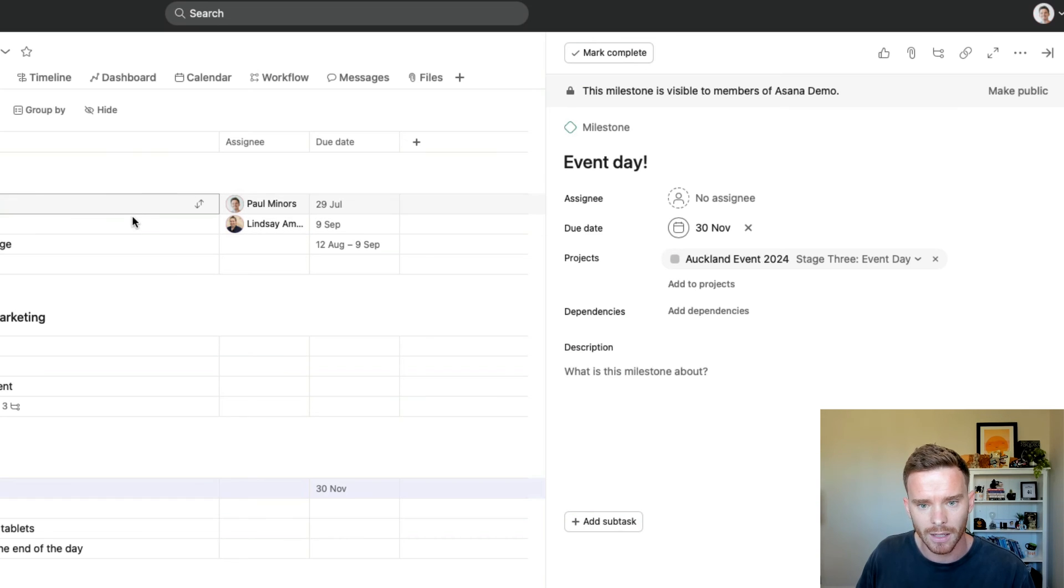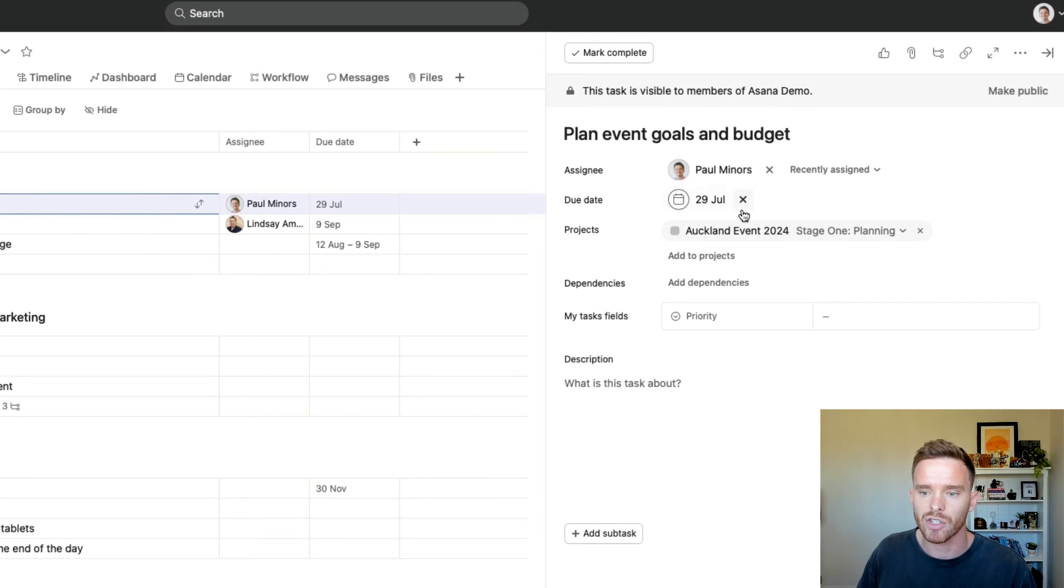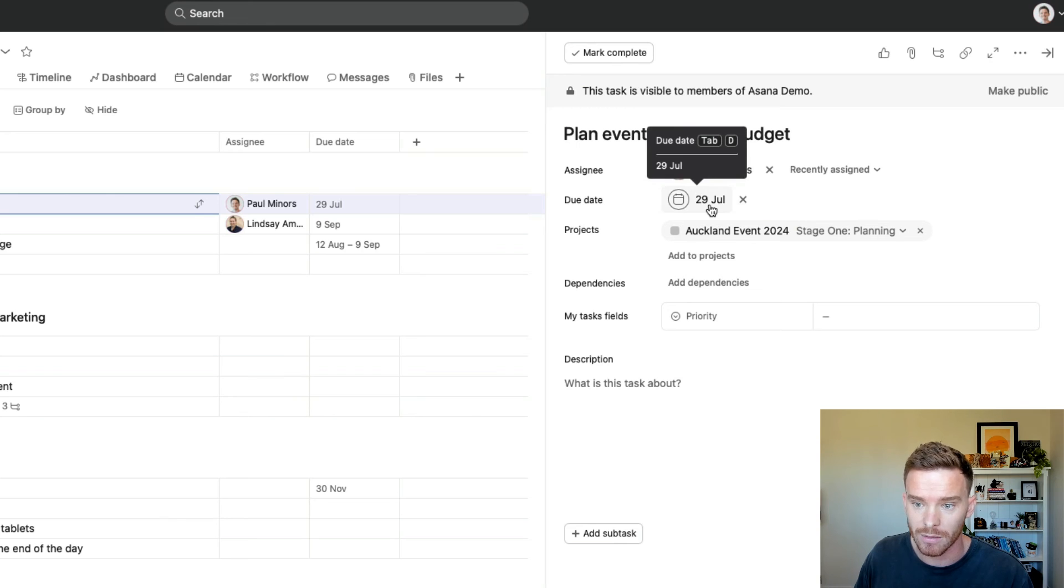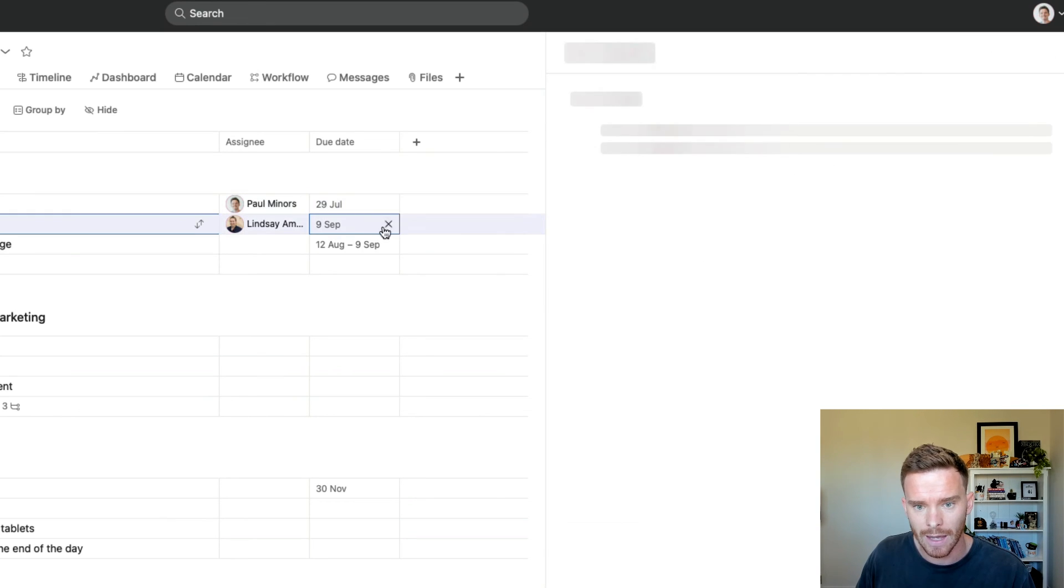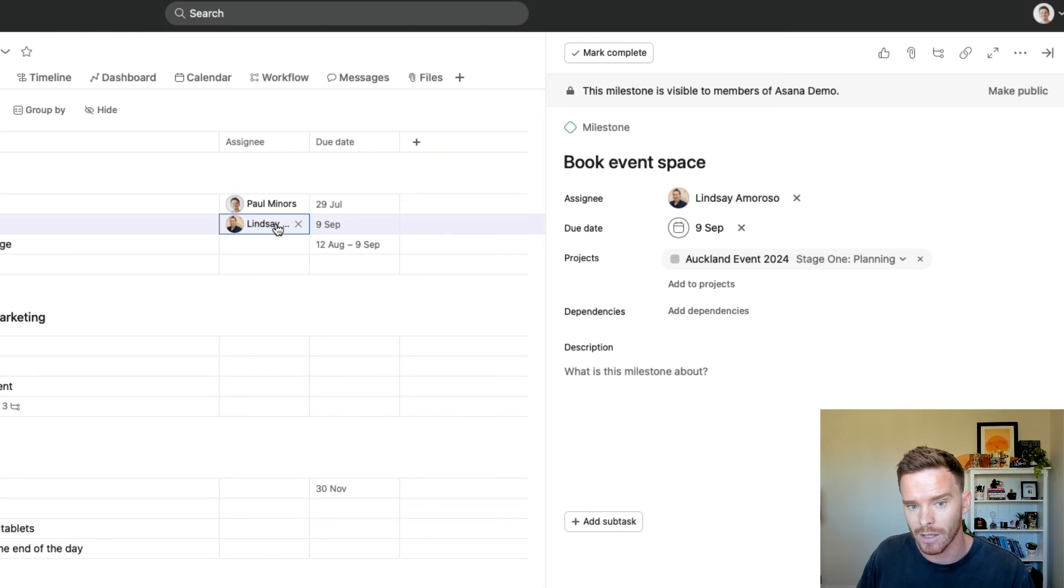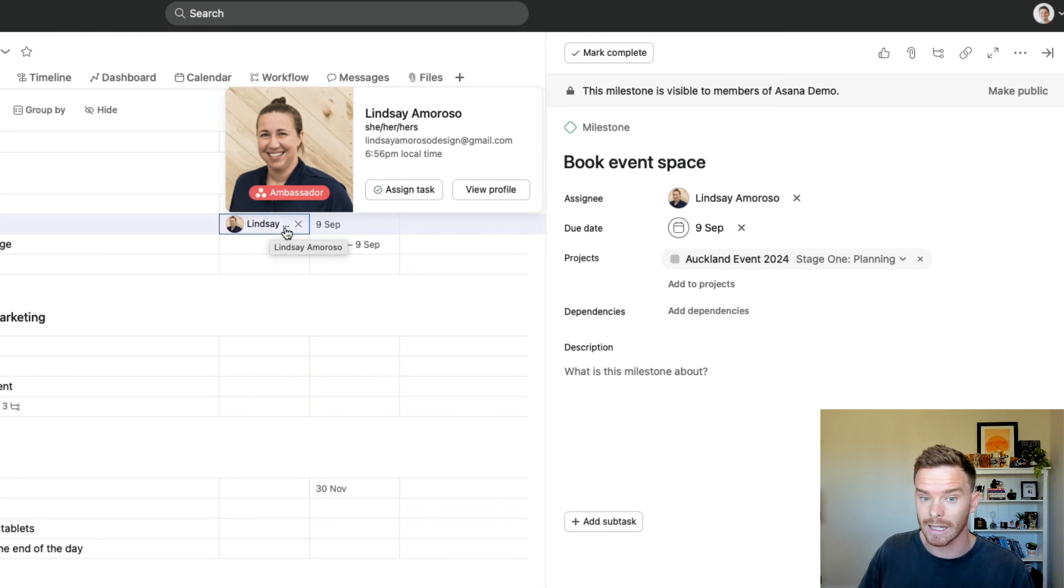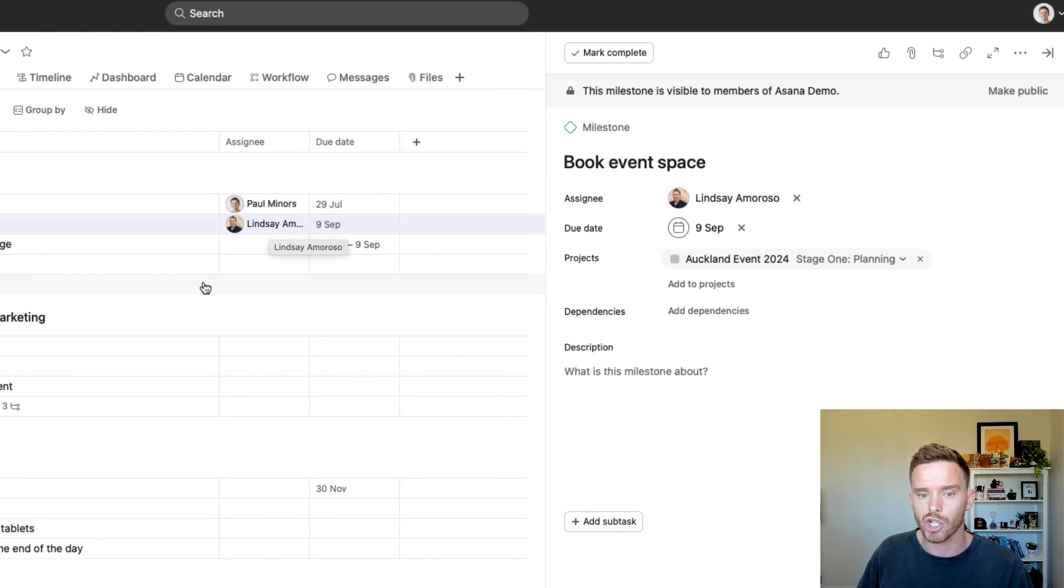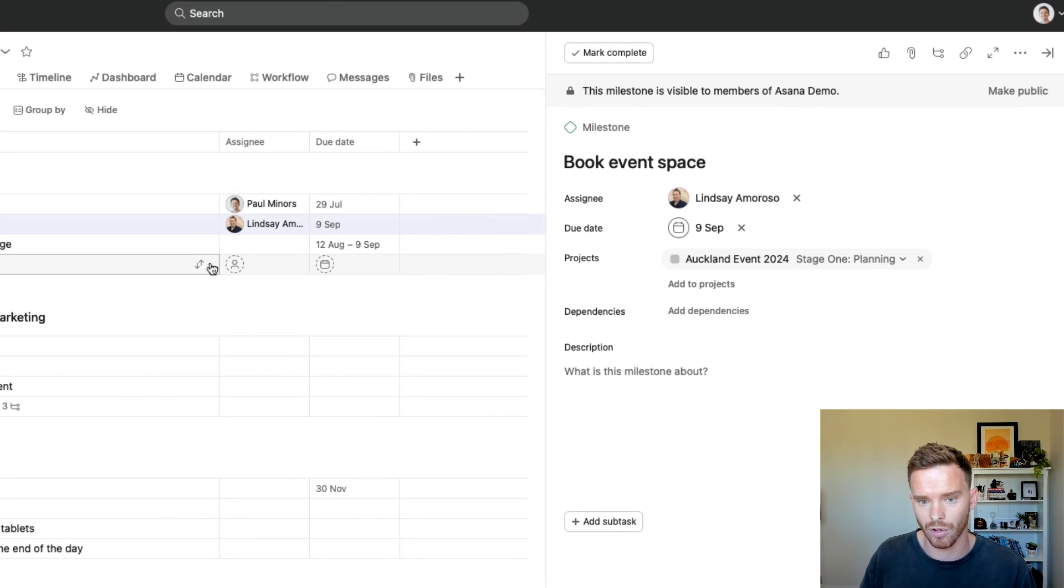And this task here, planning the event goal and budget, this is due 90 days before, which is the 29th of July. These other tasks here, their due dates have also populated. And this task has been assigned to Lindsay because she is the project manager that I have assigned to this particular project.